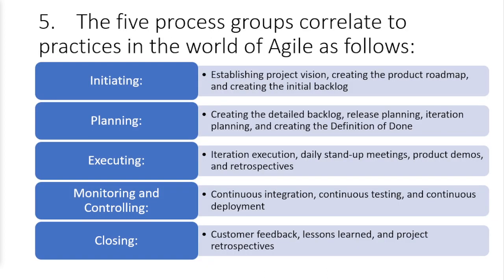Question five: correlate Agile practices to the five process groups. Initiating is like the vision — covered on pages 49 and 50 of the Agile Practice Guide. Planning spans the backlog, release planning, iteration planning, and creating the definition of done. Executing covers daily stand-up meetings, product demos, and retrospectives where the team gets work done. Monitoring and controlling maps to continuous integration, continuous testing, and continuous deployment. Closing involves customer feedback and lessons learned, done iteration by iteration — at the end of every sprint, not as a big bang at the end.